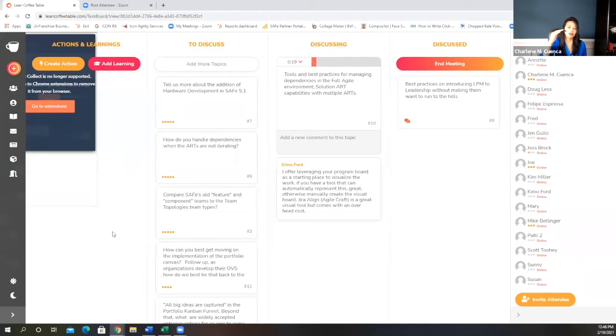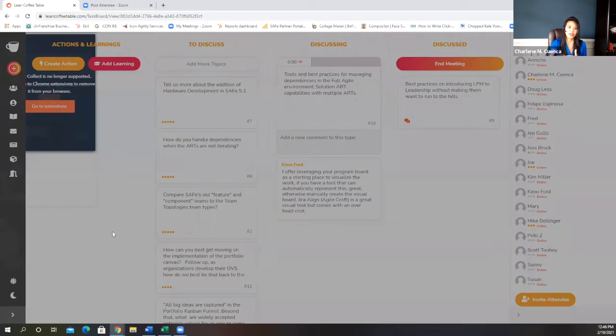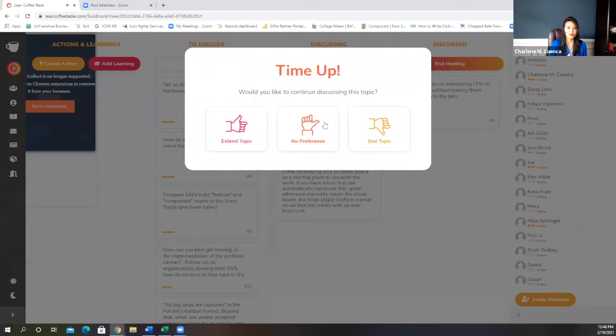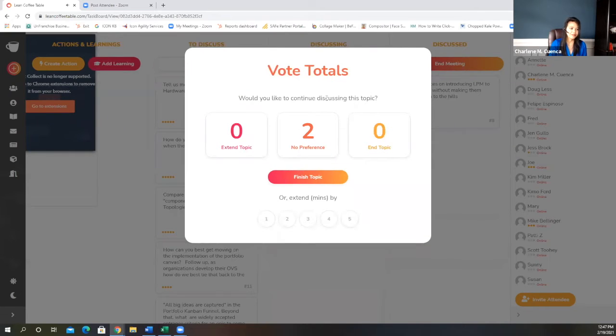And then as you start to break that epic down into features, as you go through that connected Kanban system, we get to an even lower level of granularity ahead of the PI. And a typical exit criteria I have on the feature Kanban for the train is to take another look at, for the specific feature, what are the teams within our train that are most likely to be involved, and what are the other key dependencies we may have left off. So definitely use that to your advantage.